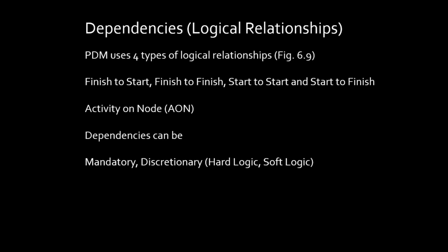The reason I want to point those out to you is because they're going to be gold to you later on in the project. Maybe the project is starting to fall a little bit behind schedule. You don't necessarily have to do major surgery to fix it. You might be able to do some nips and tucks. And some of the places you're going to be able to do those nips and tucks are in those discretionary dependencies, where maybe you can break them up and go in a different route and actually compress your schedule.